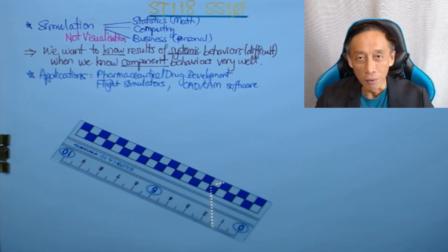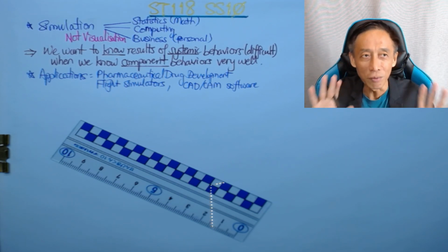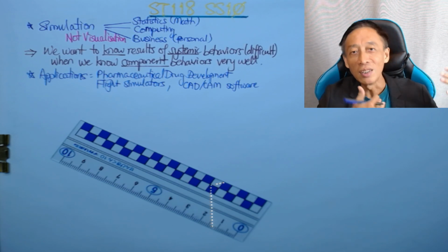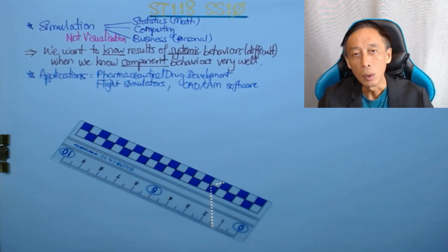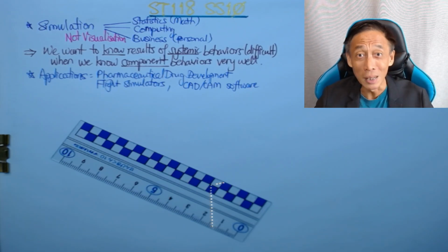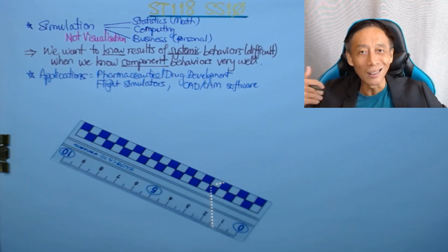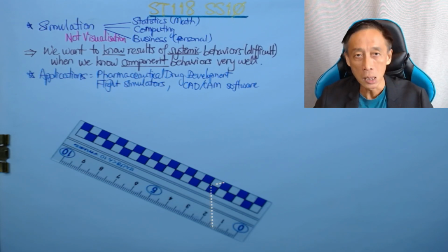But even just producing 100 is going to cost something, yes. But cost is at least a sort of a risk mitigation, so it's justifiable. But what is not very justifiable is the time delay, right? So after the first prototype, you go and correct the circuit, you prototype again, because what makes you think that the second prototype will be perfect, right? So you prototype again. So all these sequences of prototypes will extend your lead time to market, right?